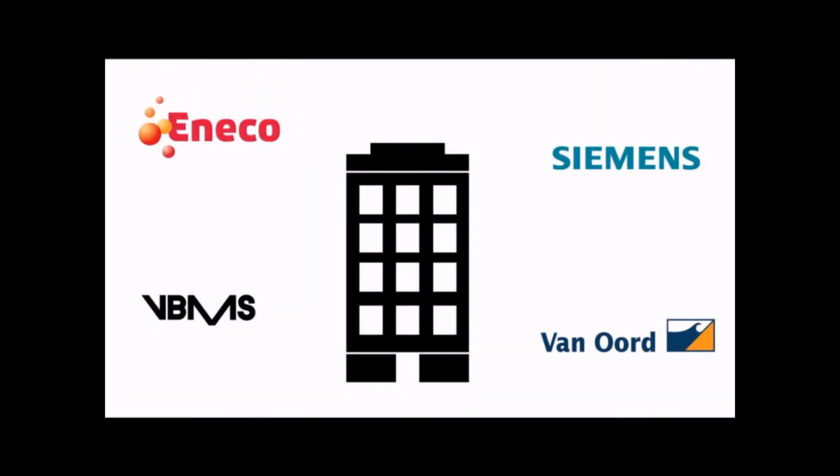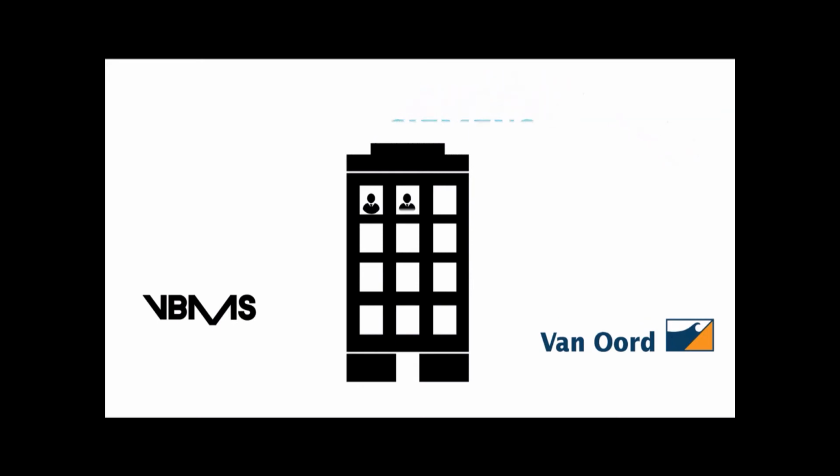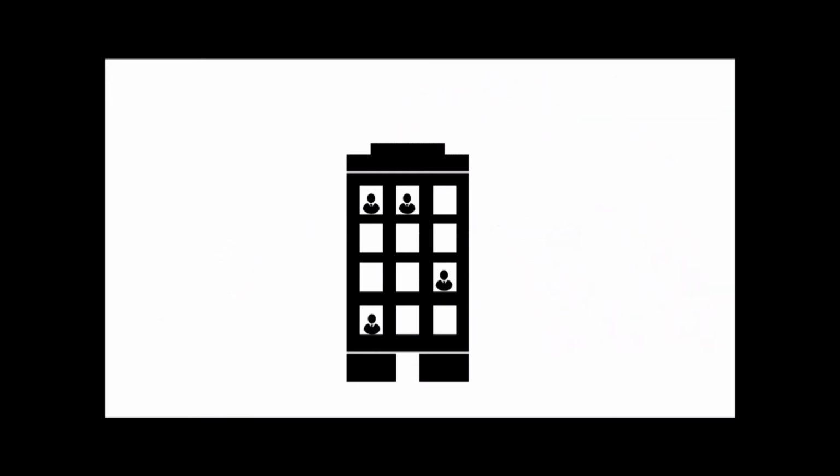The partners Eneco and Mitsubishi Corporation and the two main contracted parties for the construction of the wind farm, Siemens and Van Oort, will each delegate a special department that will work on this project in the same office on a regular basis. By doing this, good cooperation in the construction and maintenance of the wind farm is ensured, and the knowledge generated from this project can be shared and utilized for future projects by all of the involved parties.